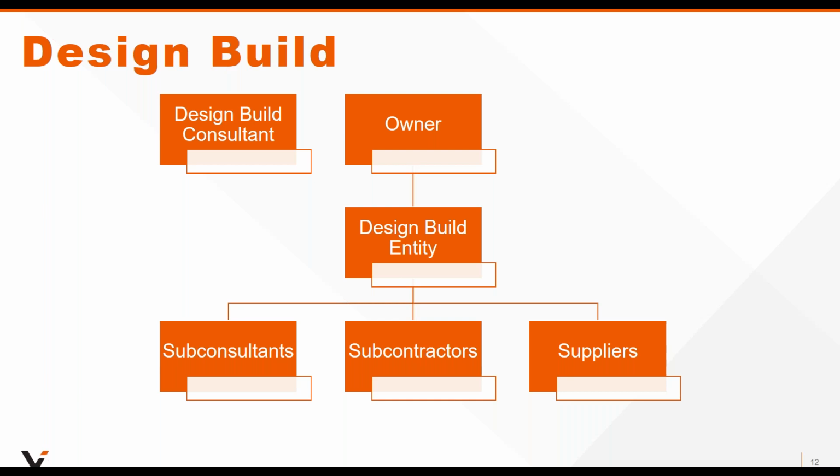Obviously, as we'll see, if the design build entity is indeed a design firm, they have to think about matters that relate to: am I licensed to do general contracting activities in the state? Is that reasonable for me to take on that responsibility? Are there bonding requirements in a public project that I will be able to meet?